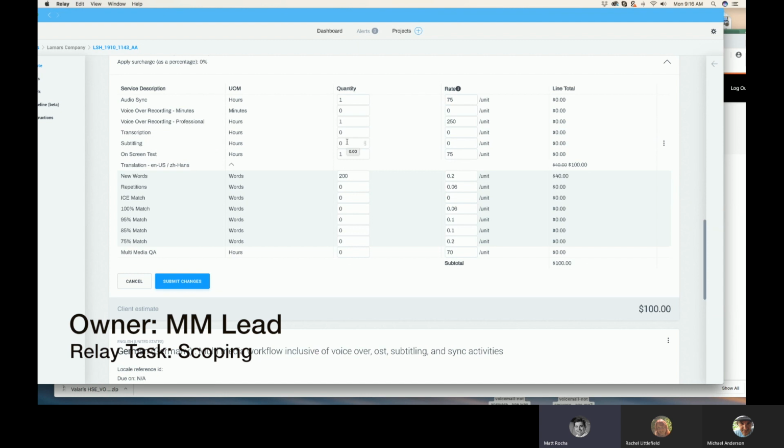And again, you could consider multimedia lead time in there if you wanted to. Also, if there's going to be a linguistic QA, there's going to be bug fixing, and that time has to be accounted for as well. So if the hour of on-screen text localization didn't include bug fixing, you need to add more time to make sure you're covering the bug fixing.